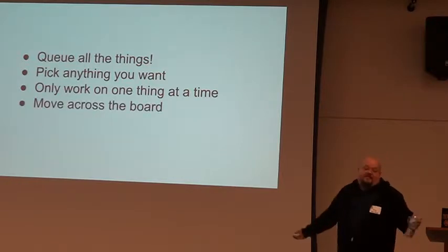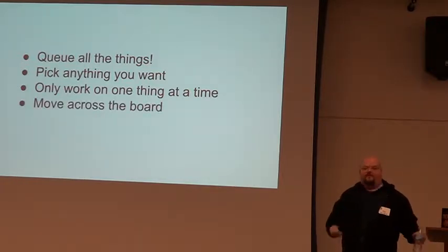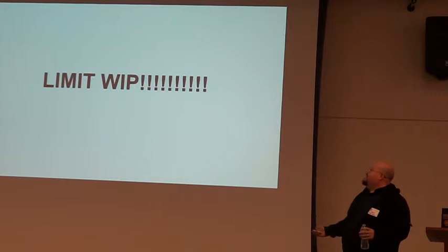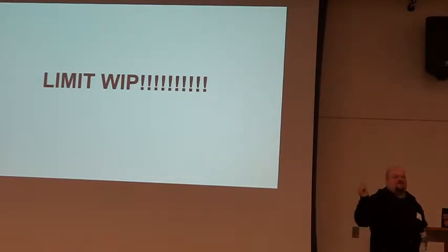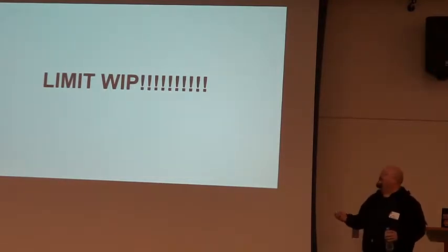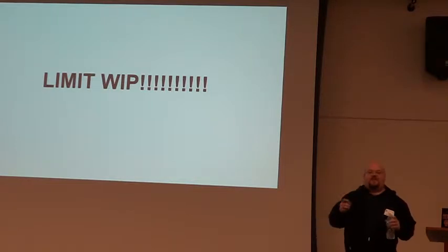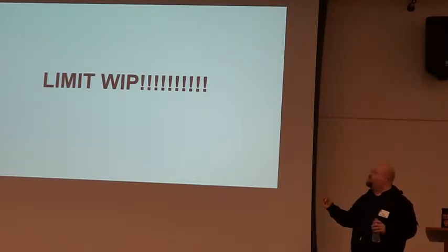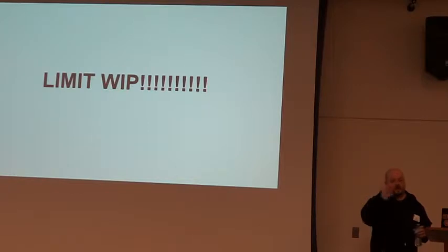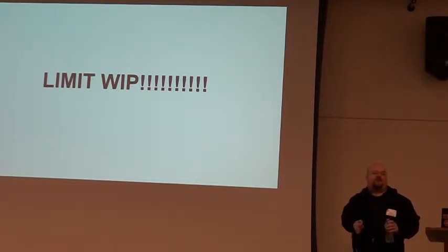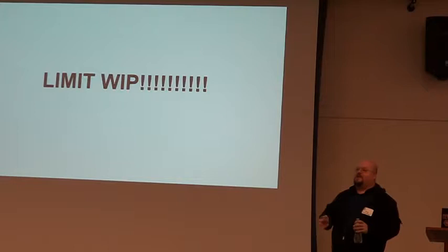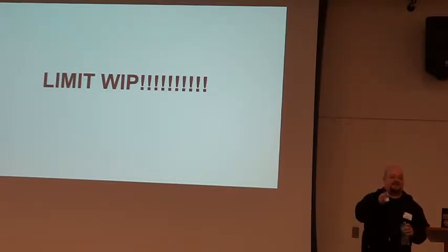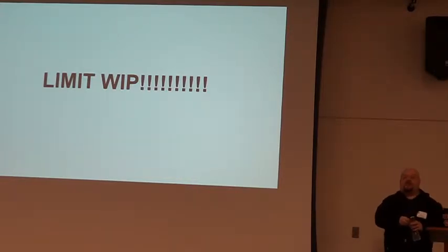And then that's it, move it across the board, right? So, we'll look around. Except, here's the trickiest part of it all. A Kanban board, the key thing that people miss when they look at one is that every lane should have a hard limit on how many items are allowed to exist in that lane. You need to limit the amount of work that's in progress at any given time. Right?